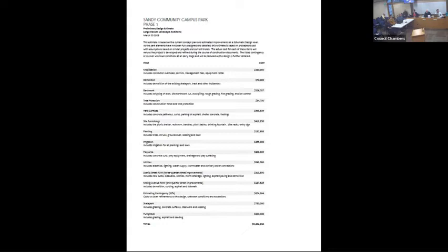However, as Rochelle mentioned, when we think about value engineering items, we want to try to do it in such a way that it's not apparent. So maybe there's ways that we can slim down on the amount of earthwork, where we're being creative in terms of how we grade the site in order to reduce that. So we make good choices up front in terms of how we can potentially reduce costs. We haven't gotten into any specifics yet, but certainly as we move into the detailing, that will be on our mind.